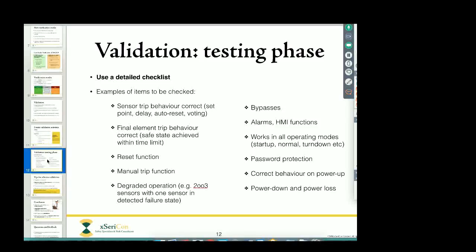In my experience, when we're actually doing the testing, we can get through about 4 or 5 functions per day. So it's a very, very big task. Now maybe once we get efficient and we speed up, maybe 6 to 8 functions per day, but do not underestimate the amount of time and effort that this will take.